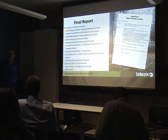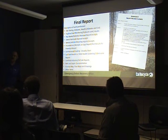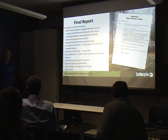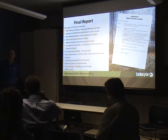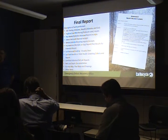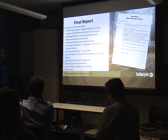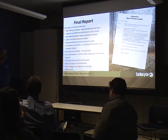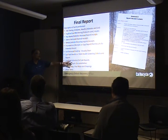It's this final report. So you just keep receipts? Keep receipts from the landfills, keep receipts from the contractors who did the cleanup work. Yeah, keep receipts and make copies of them. Obviously keep your receipts, but make copies for the county to have for their records as proof that this was done. Your consultant, your contractor's receipts for water installation, asbestos removal, soil laboratory reports.